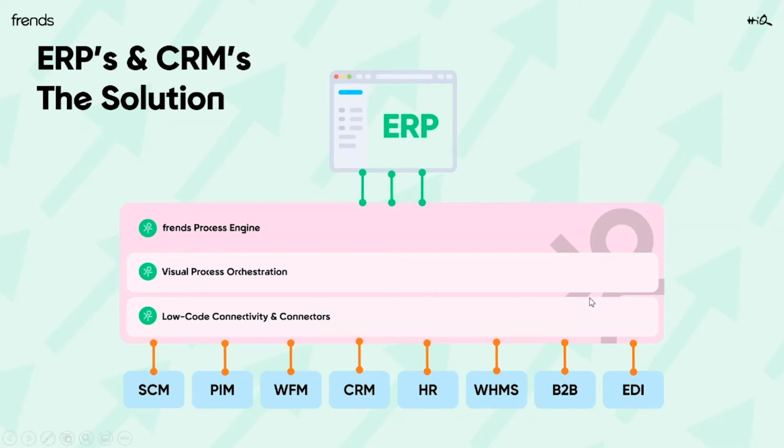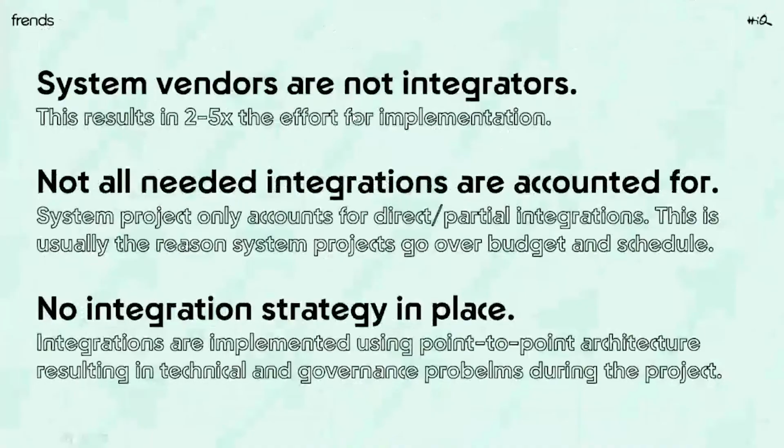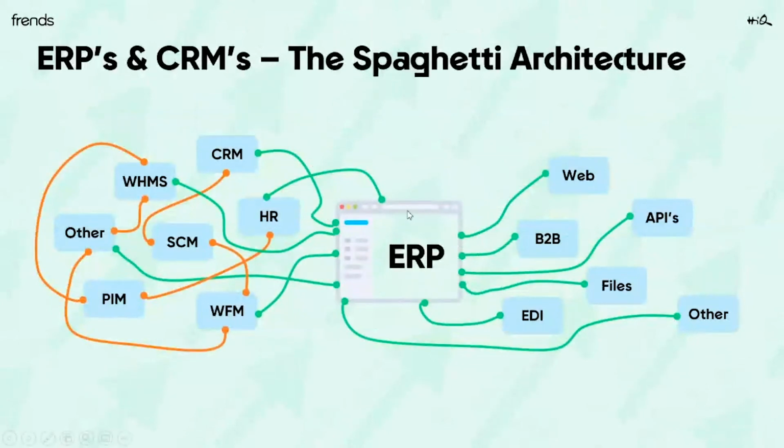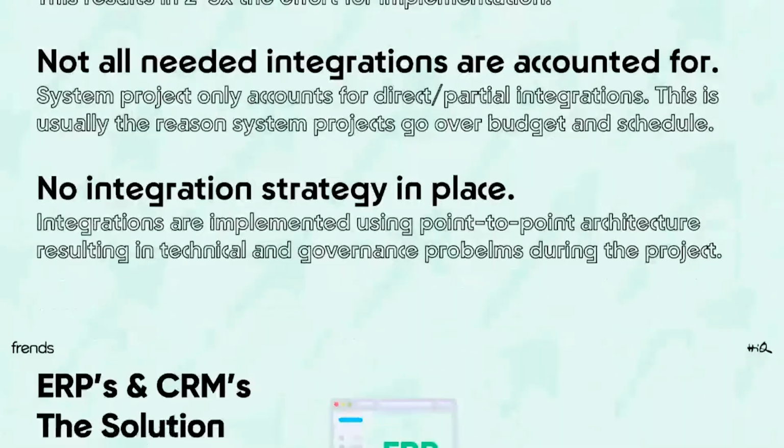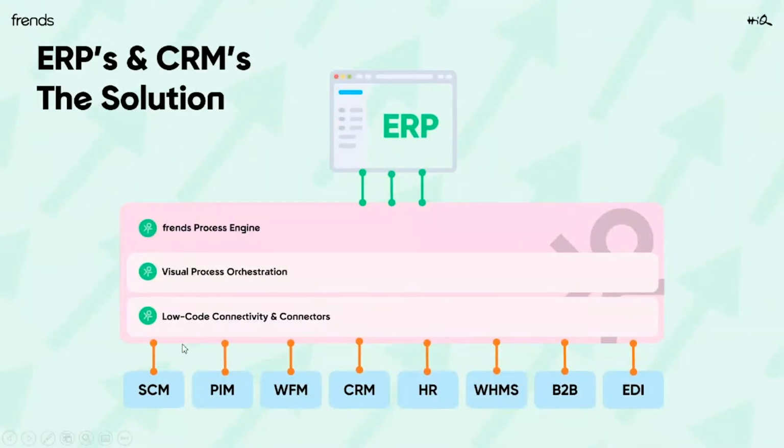And of course, this also results in the second big benefit, which is that if we turn the project on its head a little bit, rather than trying to implement the ERP first, or create the rollout project first and finalize the ERP and only afterwards create the integrations, the correct pattern would be to first implement all the necessary system, business partner, and dependency integrations.